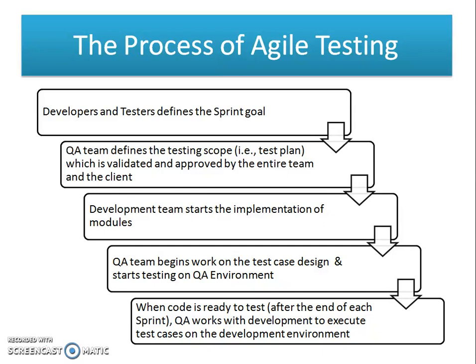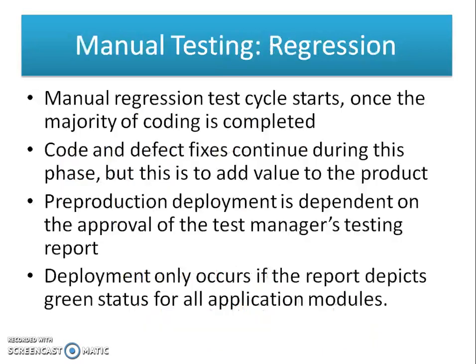Important elements of Agile testing include testers and QA managers as members of the Agile development team. For manual regression testing, once the majority of code is completed — in the last planned sprint — the manual regression test cycle starts. Coding defect fixes continue during this phase to add value to the product. For pre-production deployment, deployment is dependent on the approval of the test manager's testing report. Deployment only occurs if the report shows green status for all application modules.